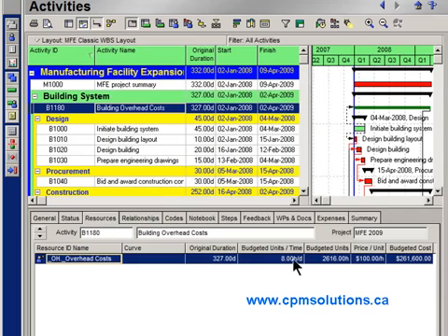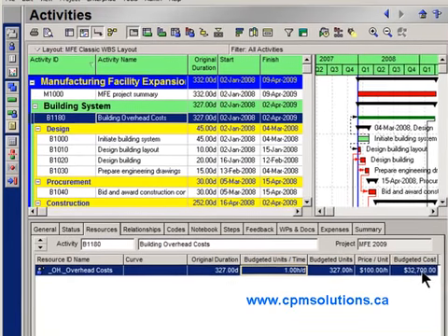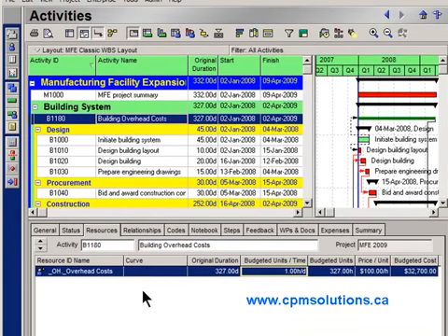Assign it in there. Now, notice the rate is $100, and so I'm going to assume that for 1 hour, for every day, my overhead costs are $100 for all of my crew. I know it's a small number in reality, but over the course of the 327 days, that really gives me $32,000 in overhead costs. Now that's kind of cool.